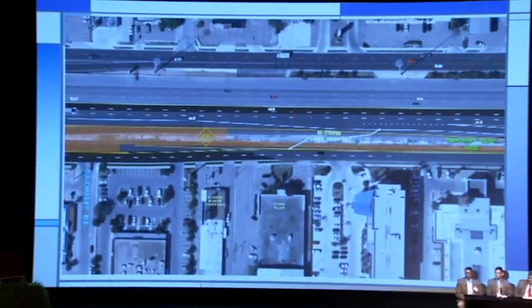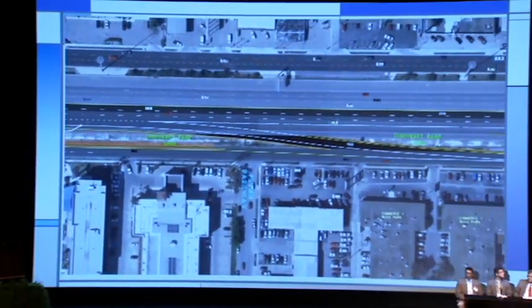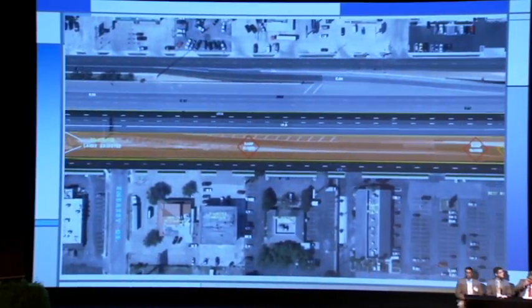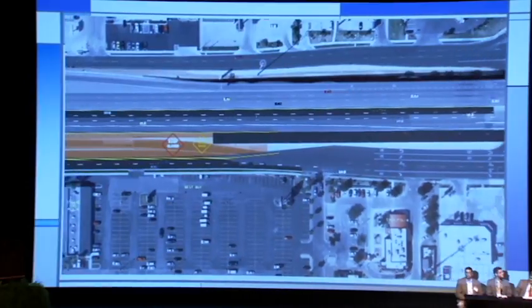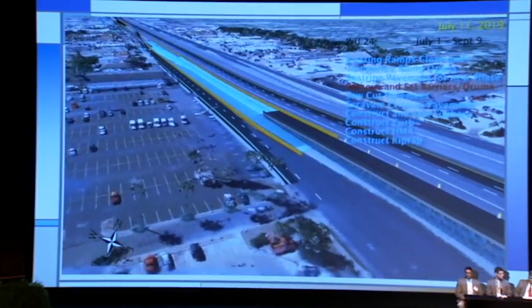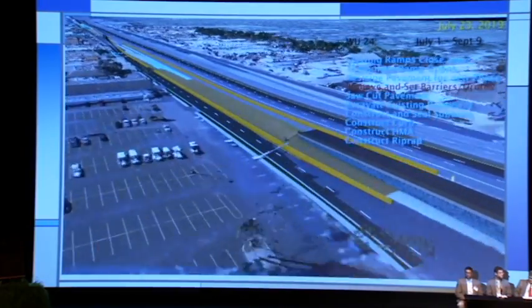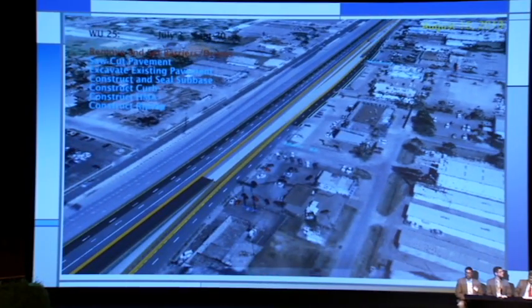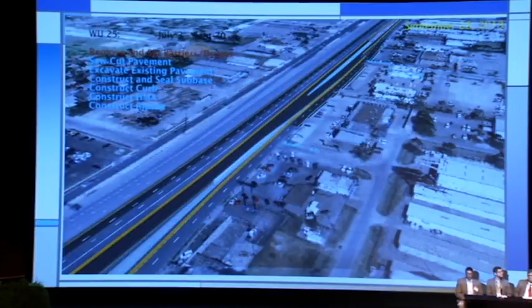As we go through these, we're potentially going to be working in the future on a 5D presentation, and that 5D presentation will add the aspect of the money that's being spent. We would be incorporating our major items in the construction event, ticking those costs up as the time ticks down through that. We think that's going to add an extra amount of information that can be used as you go through the construction of the project, as well as in the planning sections, as far as how the money is going to be spent.